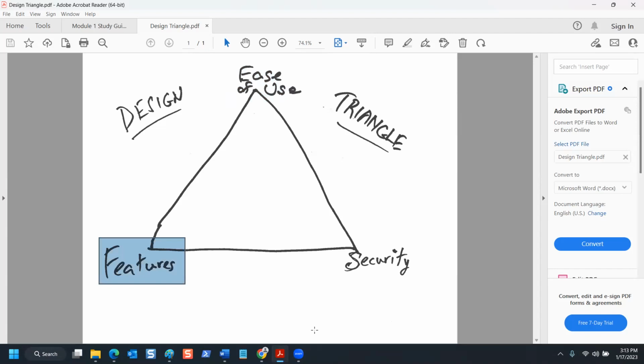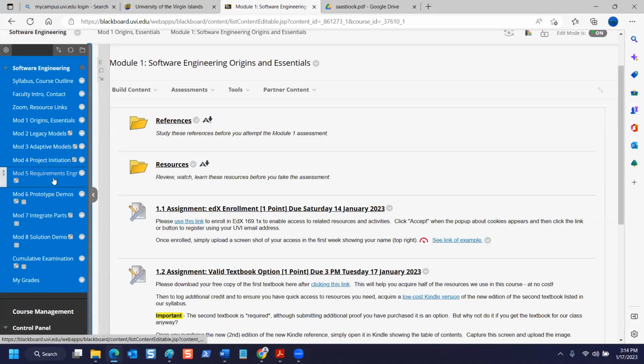But I have to know what's the most important stuff you need, and whether or not using it with ease is actually a more important criteria than the number of features on your screen. You have to have that conversation with your customers. And if you don't get that in writing, you have failed in that stage or aspect of software engineering known as requirements engineering. Everybody with me?